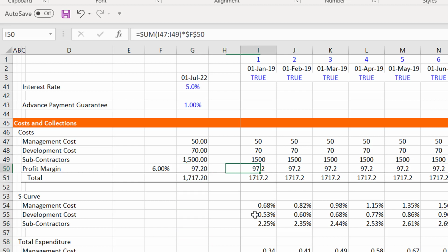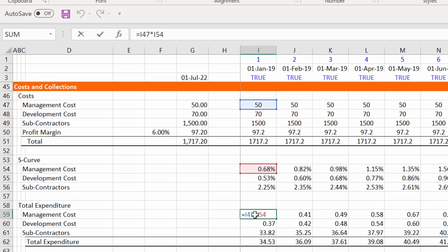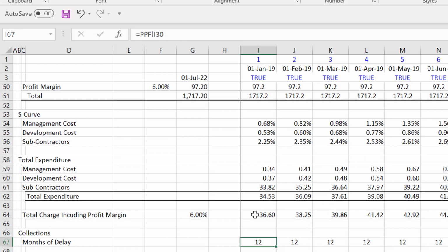And then you start with some costs, okay? And all we do here is put the total amount of the costs, nothing there, just use F4. And I hope no matter what kind of model you have, you start with this little thing to the left. And then we just plop our S-curve in, multiply our S-curve by the amount, and we get our expenditures.